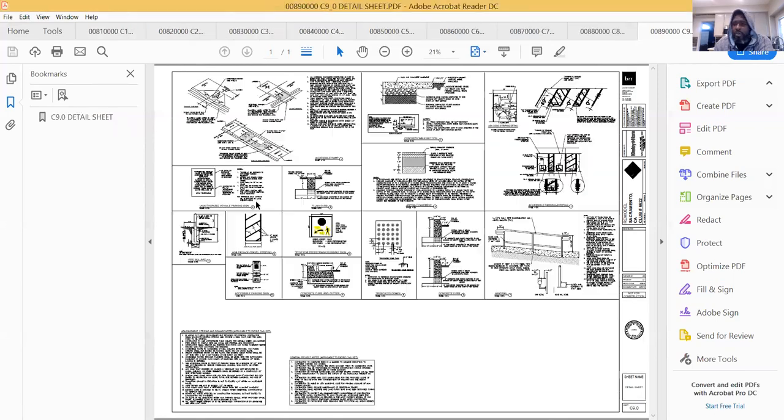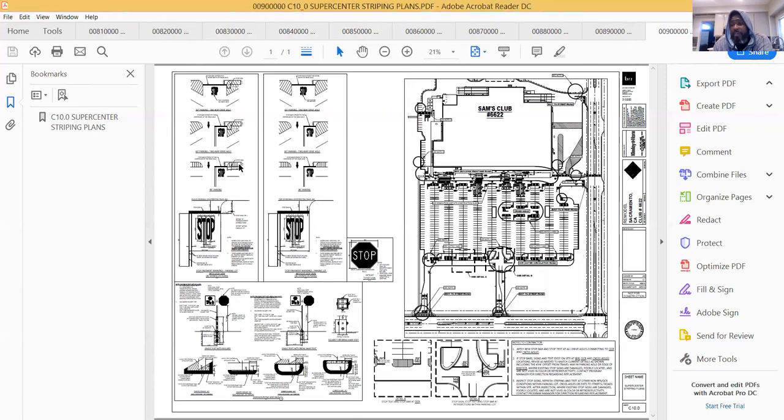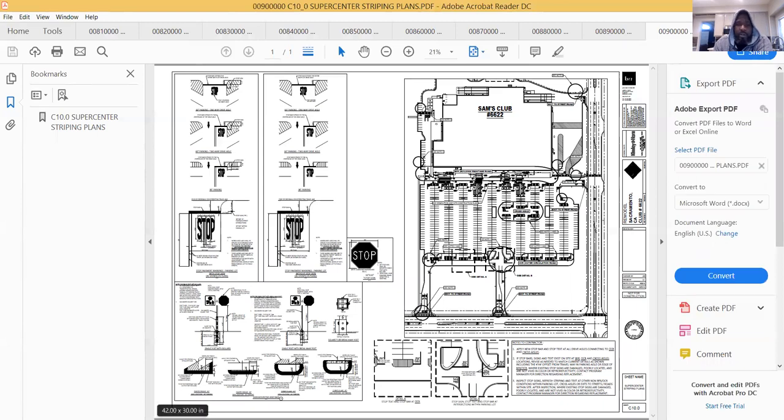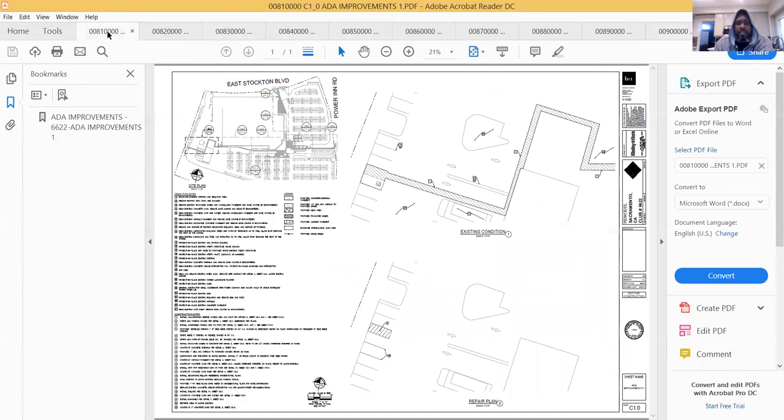So the process with this is you read the specs, and you're supposed to take the insurance section of the specifications. And sometimes the specifications are on the plans. Some projects don't have a specification book. Some put them on the plans. There's been projects where I've seen them actually on the plans. So you may find them there, right? But read the specs. Take the insurance section of the specs and make sure you send that over to your agent, so you can make sure that your insurance covers the requirements there, okay?